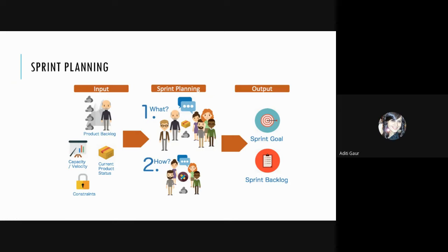In detail you already explained. At a high level you say this is the thing that has to be done for the story, and then you check with the team. Do you know how to do it? The Scrum Master will give time for the team to discuss how to do it. Let them discuss. Once the team decides how to do it, the Scrum Master will ask the team members who wants to take this up for development. One of the developers will pick it.